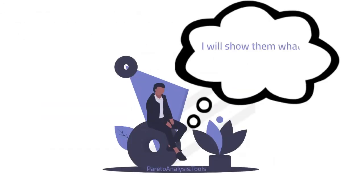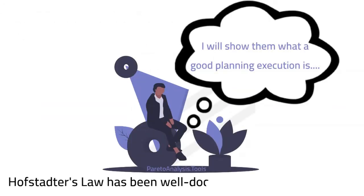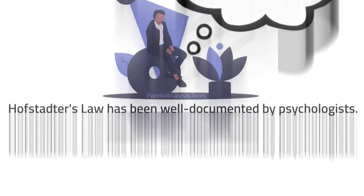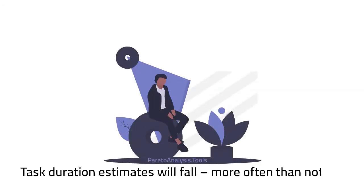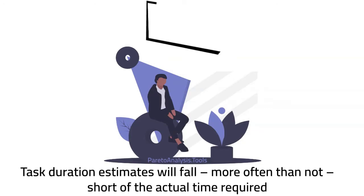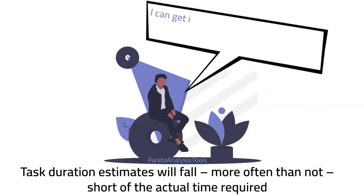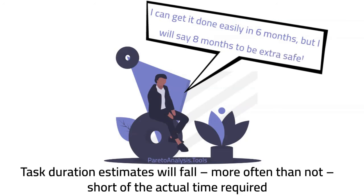Hofstadter's law and the planning fallacy phenomenon have been well documented by psychologists. Task duration estimates will fall, more often than not, short of the actual time required, even when the time allotment is increased to compensate for the human tendency to underestimate it.